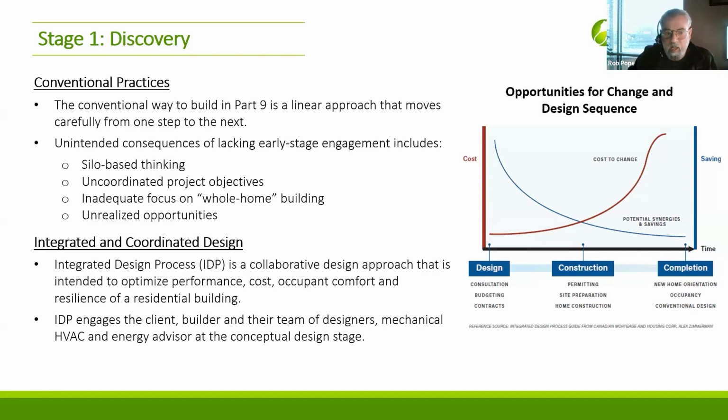You want to avoid all that, and you'll hear this term a lot in the industry, integrated design, IDP. It's just a fancy terminology for just get everybody together up front that has some impact on how it turns out, and work it out, coordinate, collaborate, get all the ideas sorted and nailed down so that when the final set of plans is done, it includes everything you need to know. And now you just have to follow it.